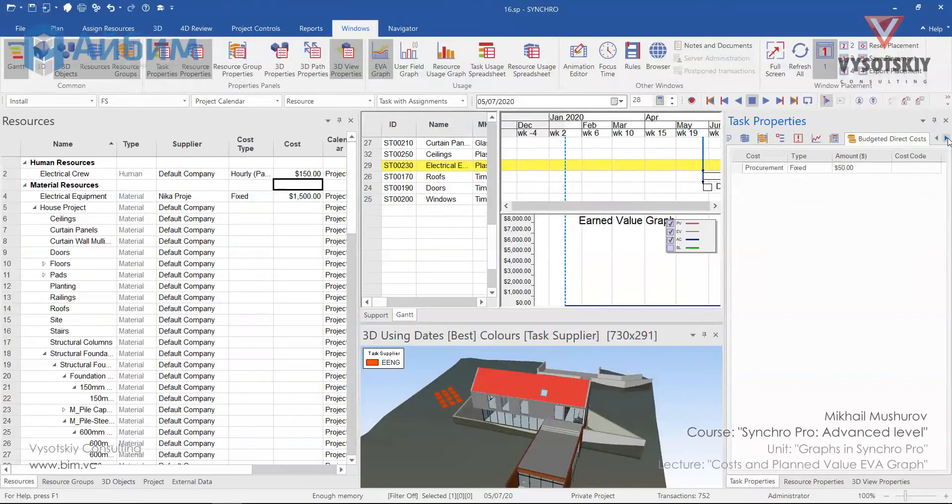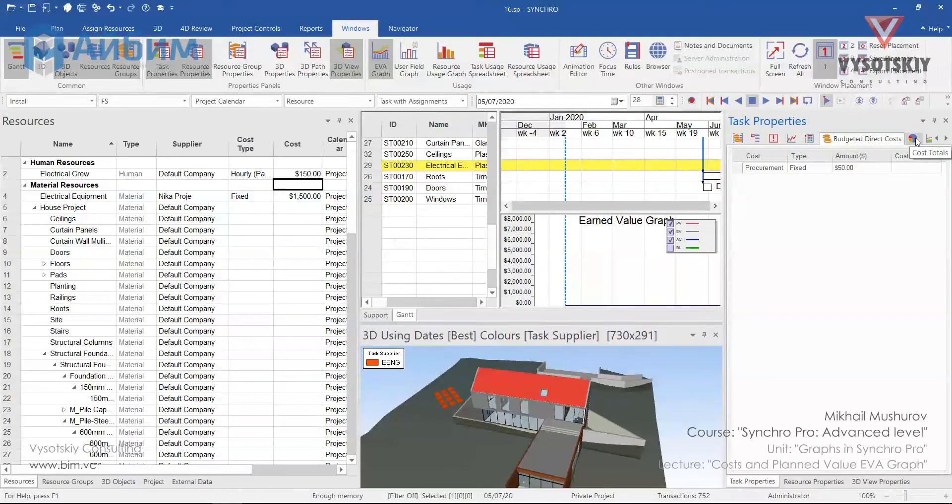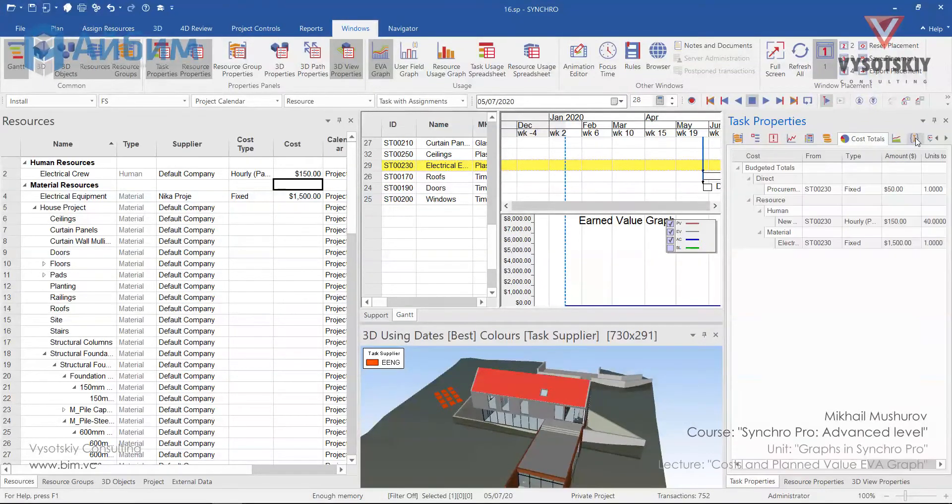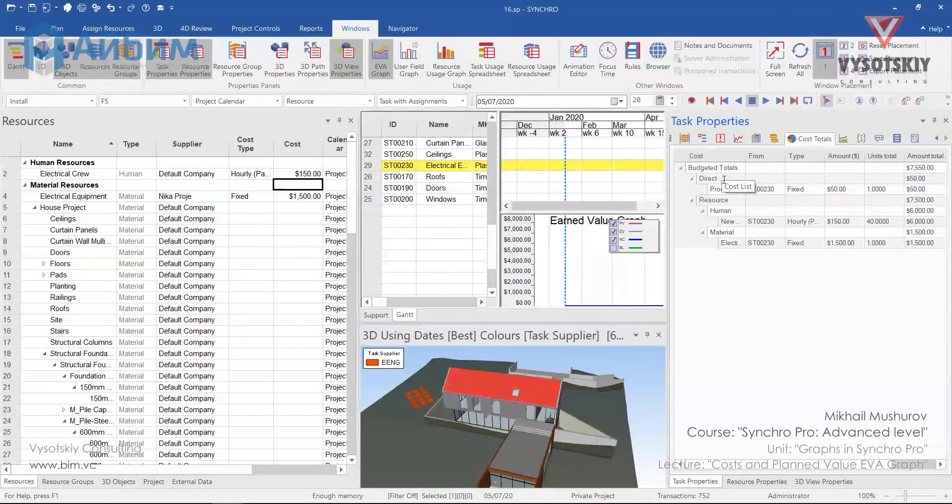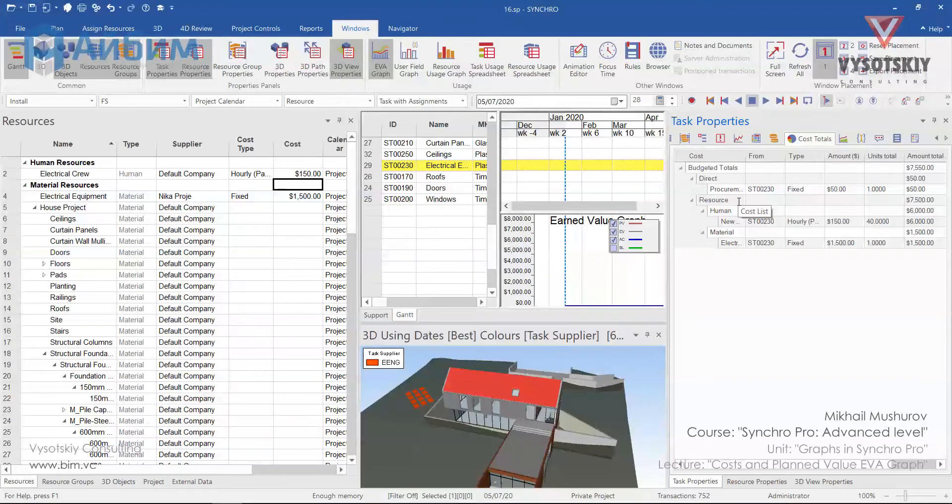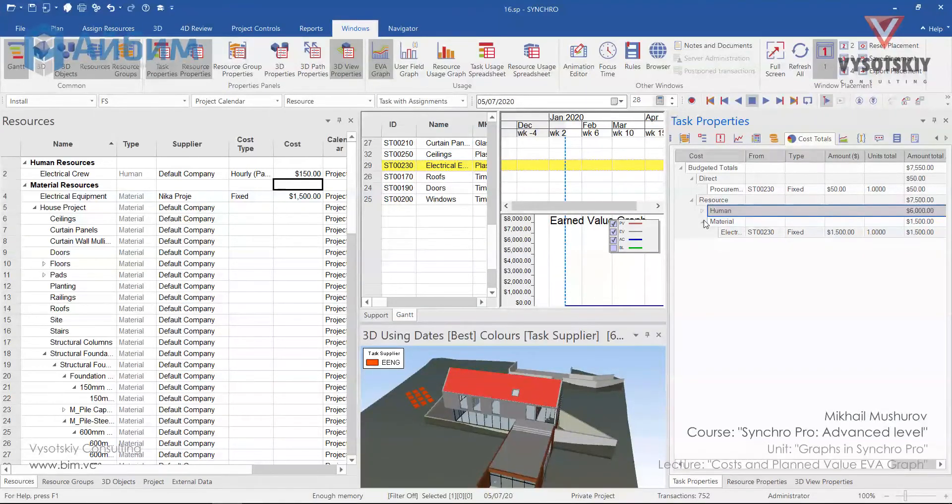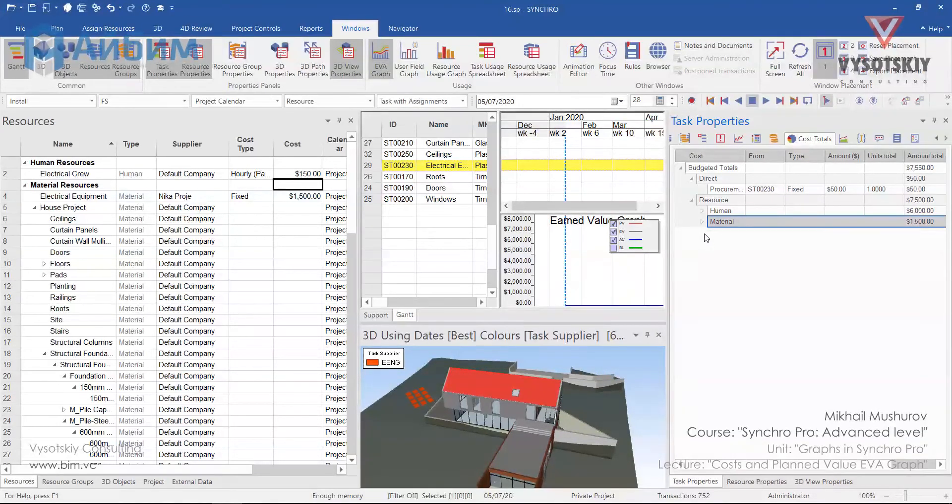Now we can open total costs. The pie chart next to the budgeted direct costs and see the totals. So the costs here are separated under the budget direct costs and resource costs, which are human and material. Also it might be equipment and location.